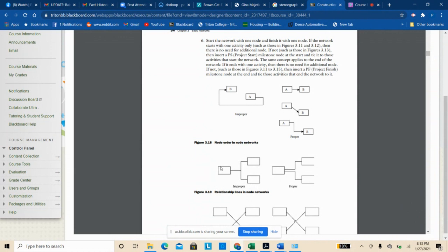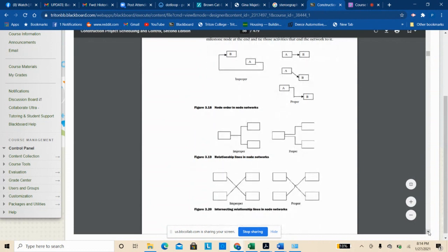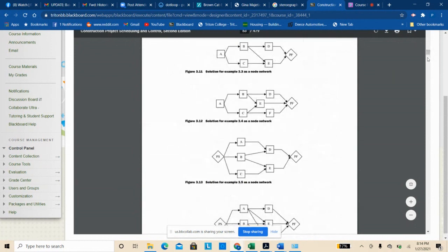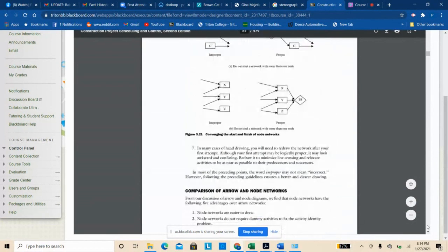You want to show from A to B is a unique path, and A to C is a unique path. So you don't want to put common lines if it can be avoided, or it should always be avoided. But crossing, again, you have that jump thing. Those are the kind of things that will help you in any case. Just always try to show unique paths. Those are all just the tips for what you're trying to show.